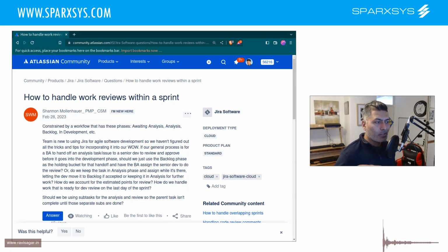Then you can have a separate Scrum board that will act like a place where you display those epics that are ready for development, and then you put them in the backlog. That Scrum board's backlog will basically have any epic beyond the ready for development state, and then you pick it up for delivery and work on it. You basically break down your stories.